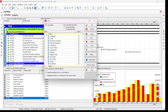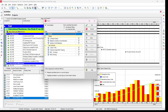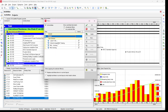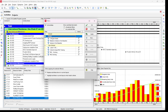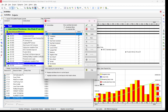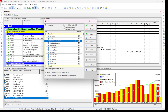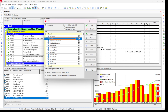In the filter dialog box you can see there are three categories: Default, Global, and User Defined. User Defined is the one which we create for our own use. Global is the one which you can transfer with the projects to other users, and Default is the one which came with the installation of the software. The built-in filters include options for completed activities, critical activities, having a constraint, in-progress activities, and longest path.